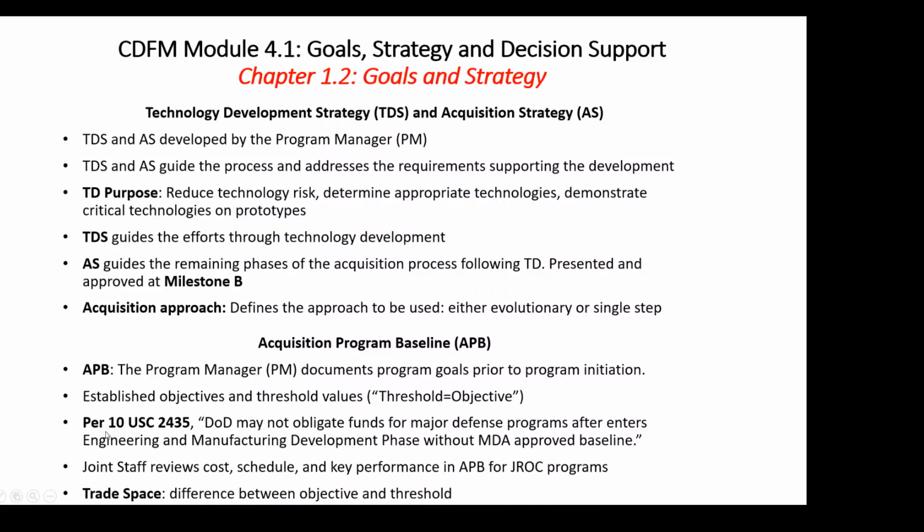This just gives you the law per 10 U.S. Code 2435: DoD may not obligate funds for major defense programs after it enters engineering and manufacturing without the Milestone Decision Authority approving the baseline. So remember, I talked about before you move to a phase, before you do anything else, before you spend any money, the MDA must approve.